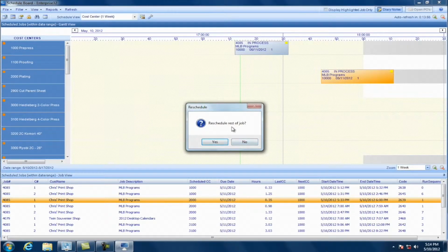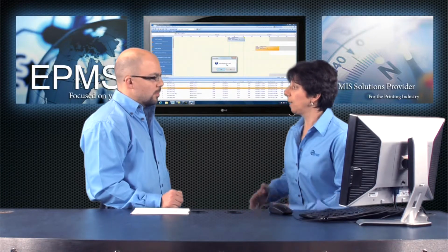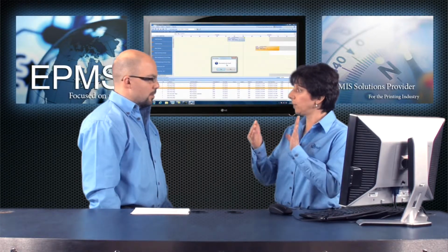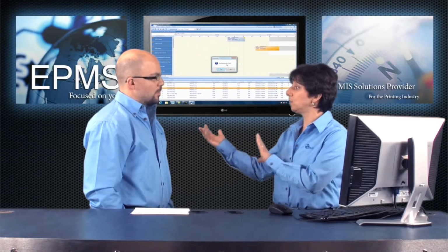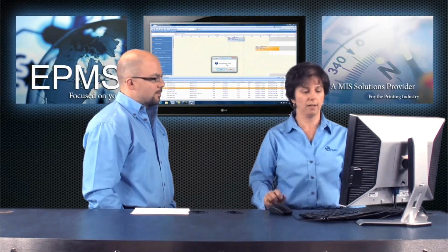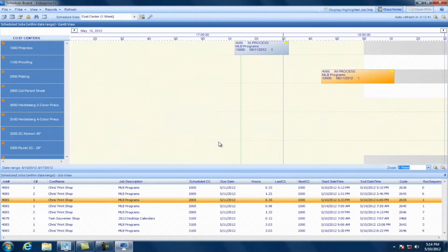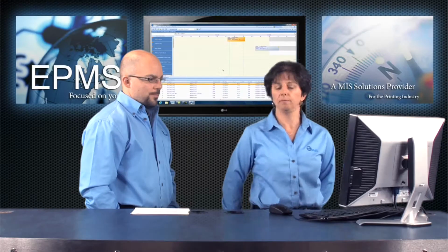The other thing it will do is, do you want to reschedule the rest of the job? And what that will do is, based on the change that you just made, it will look at the times everything else is scheduled past that and adjust accordingly. Okay, excellent. So if I click on yes here, it'll readjust the schedule, and you're done.